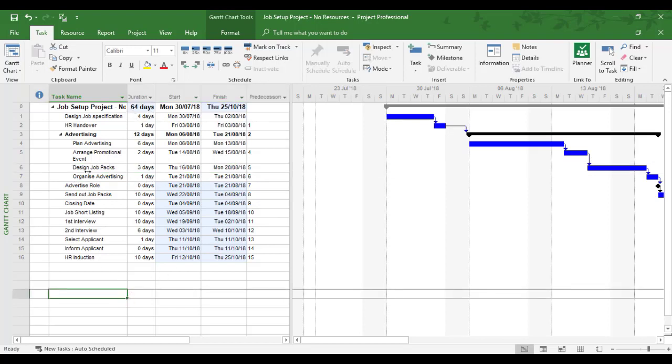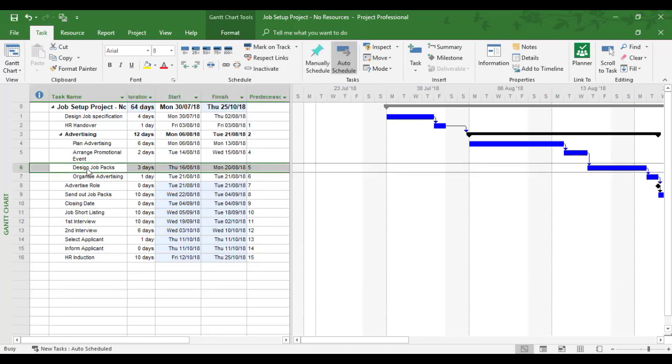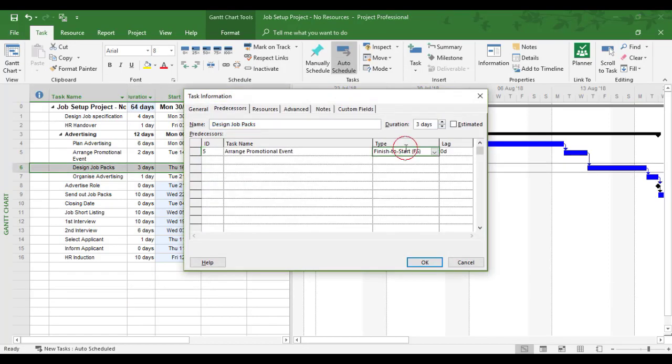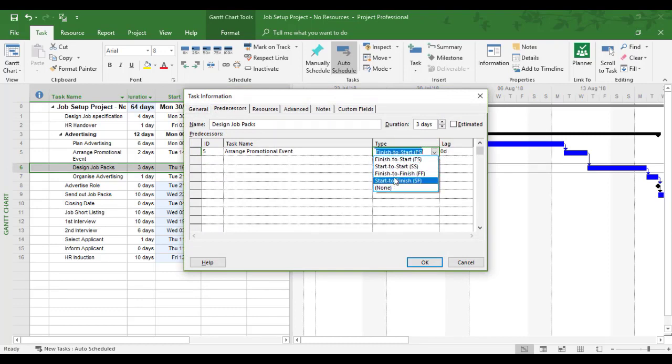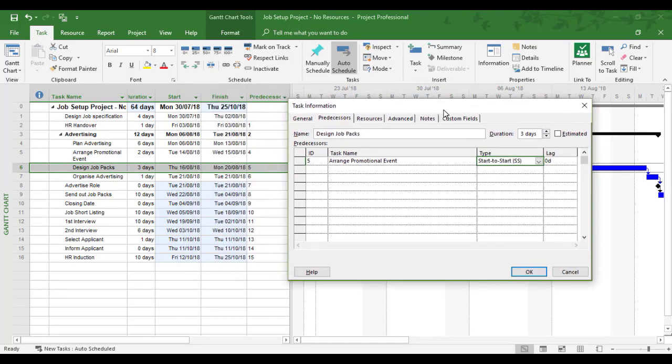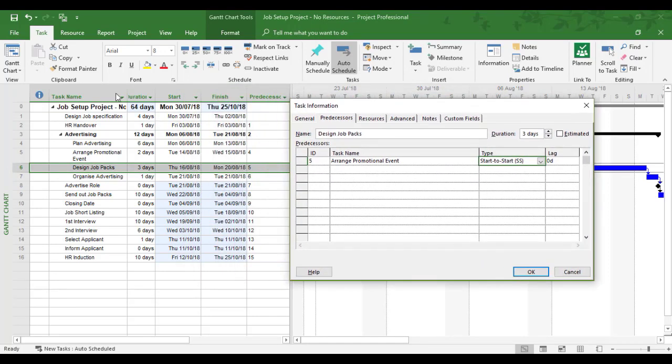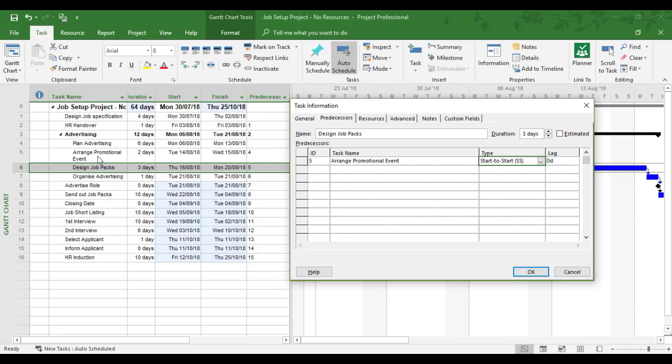So I'm going to double click task six. I'm going to change it to start to start. And we're going to make a note of the duration which at present is 64. Start to start with arrange promotional event. And then okay.